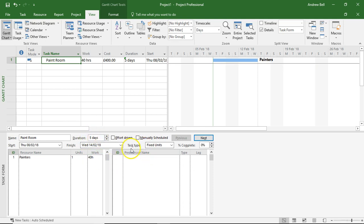Now, this task type is defaulted to fixed units. This is the default in Microsoft Project.